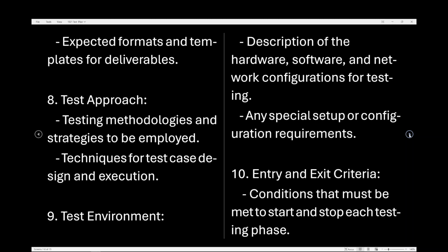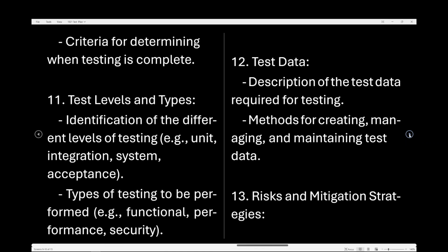Test environment: description of the hardware, software, and network configuration for testing. Any special setup or configuration requirements. Entry and exit criteria: conditions that must be met to start and stop each testing phase. Criteria for determining when testing is complete.